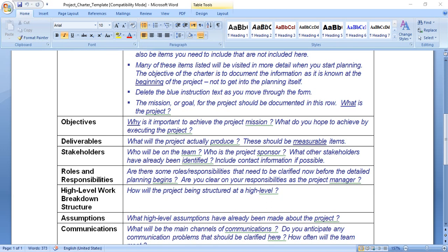Number two, project milestones. The purpose, start and end dates of project phases, for example, inception, planning, construction, testing, and deployment, and other major milestones. For a large or complex project, list high level milestones as a bulleted list and attach a milestone addendum with as many details as are needed.